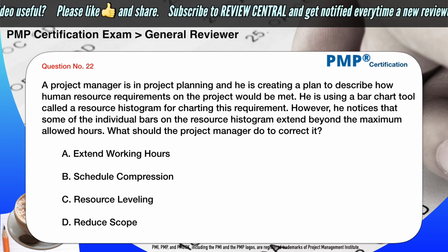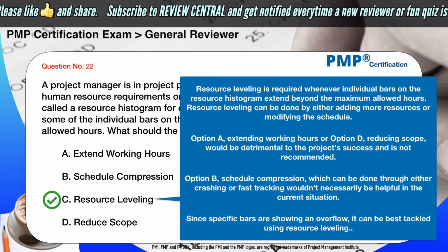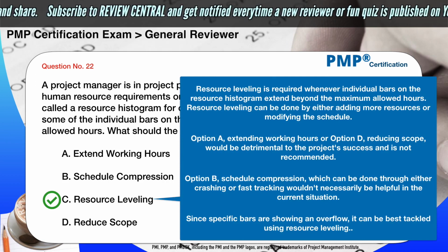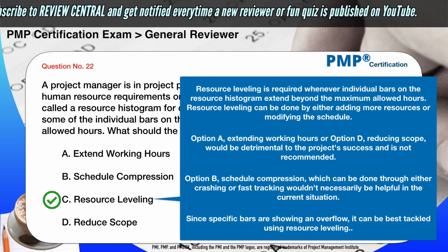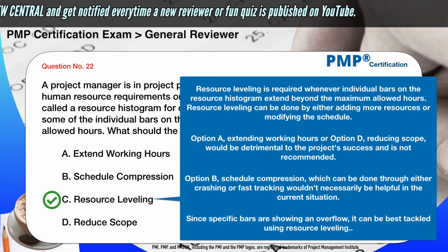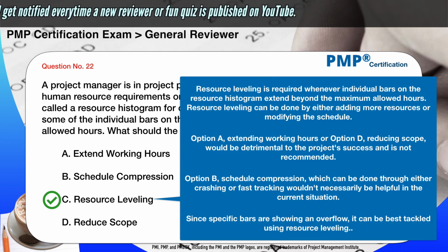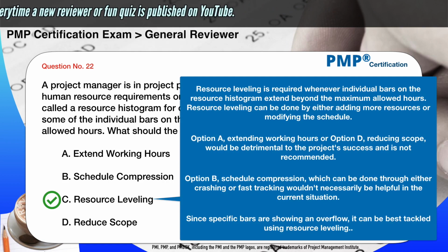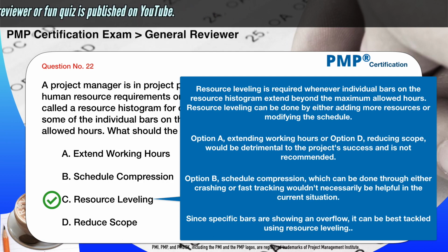The correct answer is C. Resource leveling. Resource leveling is required whenever individual bars on the resource histogram extend beyond the maximum allowed hours. Resource leveling can be done by either adding more resources or modifying the schedule.